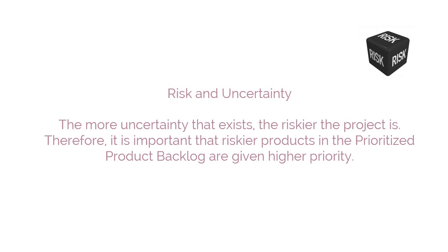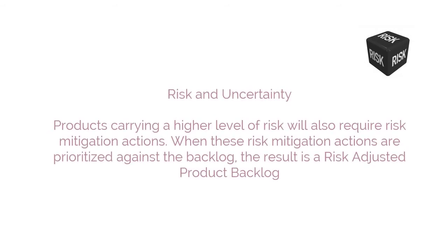Therefore, it is important that riskier products in the prioritized product backlog are given higher priority. Products carrying a higher level of risk will also require risk mitigation actions. When these risk mitigation actions are prioritized against the backlog, the result is a risk-adjusted product backlog.